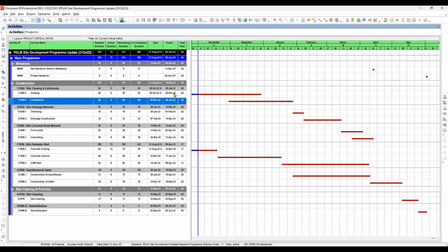Okay, so total float, here the total float, right? Total float is the duration that an activity can be delayed without delaying the project milestone or completion. If the value is positive, that means the activity is on the path of being ahead of schedule, while if it is negative, like most of these here, of course, these are critical activities, within the critical path. So it should be negative.